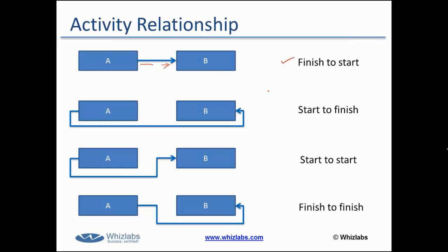Start to finish: we can finish activity B only when we have started activity A. Okay, so that's a start to finish relationship. A bit rare. You would not get too many examples in the real world. If you can think of some example, please put it on the question panel.